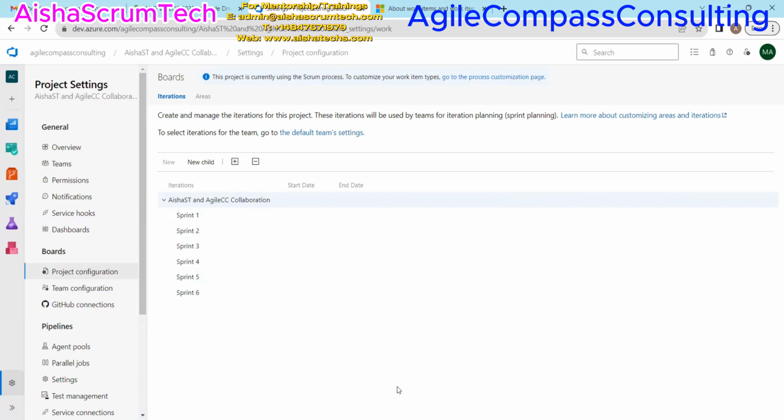That way we have a set workflow. We all start at the same time and end at the same time, and it keeps everybody in check, right? And also even the meetings in check if we need to give reports and all of that good stuff. So that's what you can do. So we'll do that in project settings. And one other good thing about sprints with Azure DevOps is that the sprints start and end automatically. So you don't need to go in and start a sprint or go in and end the sprints just like we do in Jira. What happens here is once you put in your dates in your sprints, if your sprint was supposed to end, for example, yesterday, today the new sprint will start automatically, right?